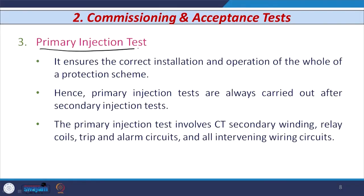The third test is known as the primary injection test. This test is performed to ensure the correct installation and operation of the whole protective system or scheme. Primary injection tests are always carried out after the secondary injection test. The primary injection test involves the secondary of the CT, the coil of the relay, the trip and alarm circuit, and all the intervening wiring. This test is usually carried out with a portable injection transformer using local main supply that has several low-voltage, high-current windings.